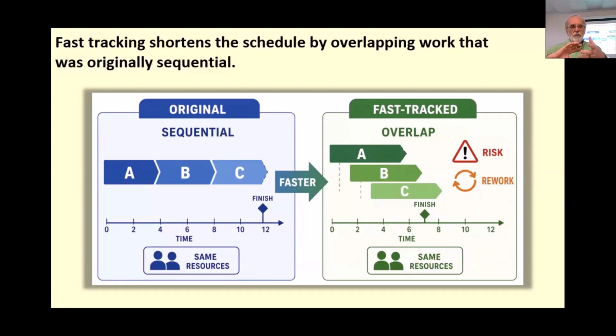One of the issues we have, though, if you have a dependency, a predecessor-successor type dependency, that means that those two activities are coupled together. And what that means is a change in the predecessor can result in a change in the successor. So if we're going to try to improve our scheduling by saying we're going to take the successor now and do it in parallel with the predecessor, in other words, we're going to do them side by side, something that happens up here could mean a bunch of rework, and something that happens in the predecessor may mean a negative impact to the successor. It might introduce rework. And that's that uncertainty that they're talking about. You don't really know. I mean, it takes some good analysis to do that.